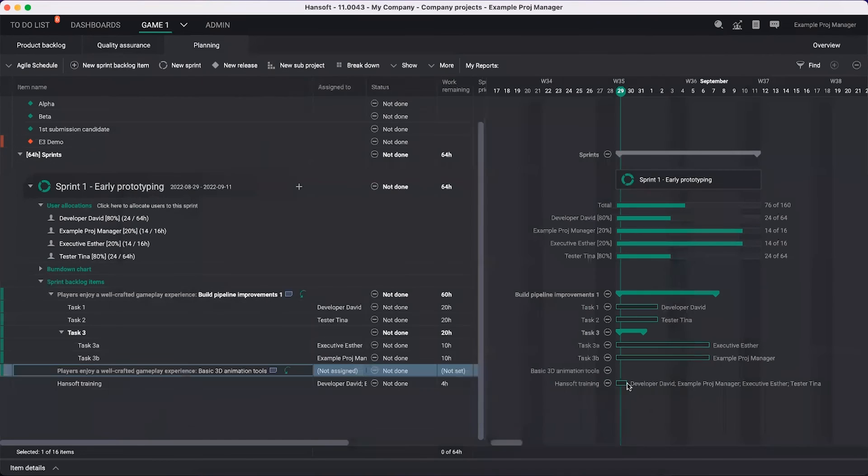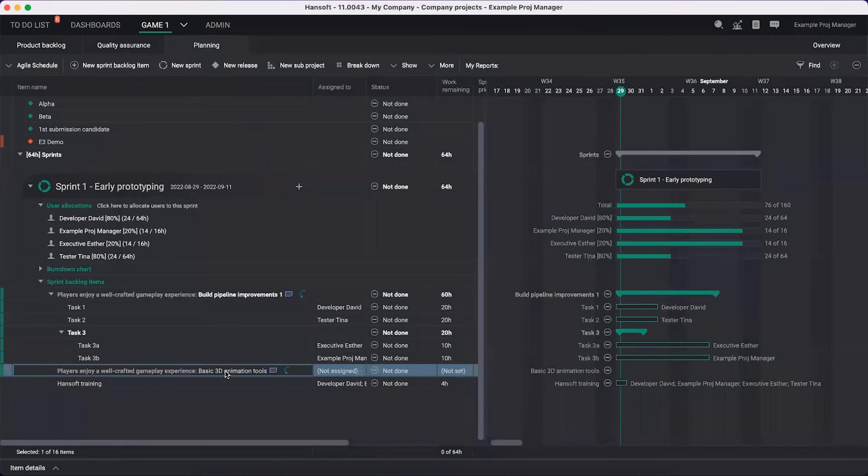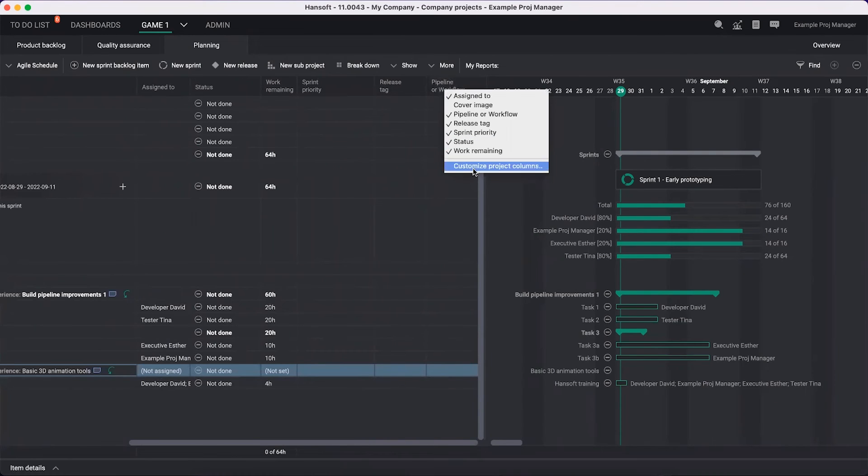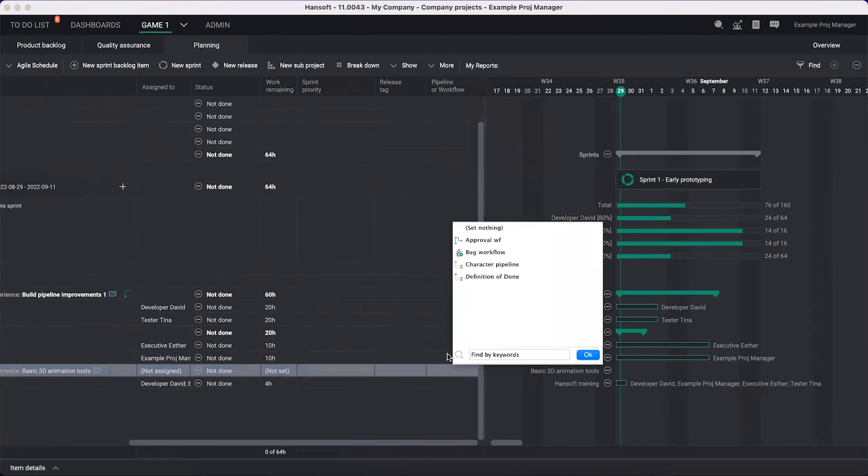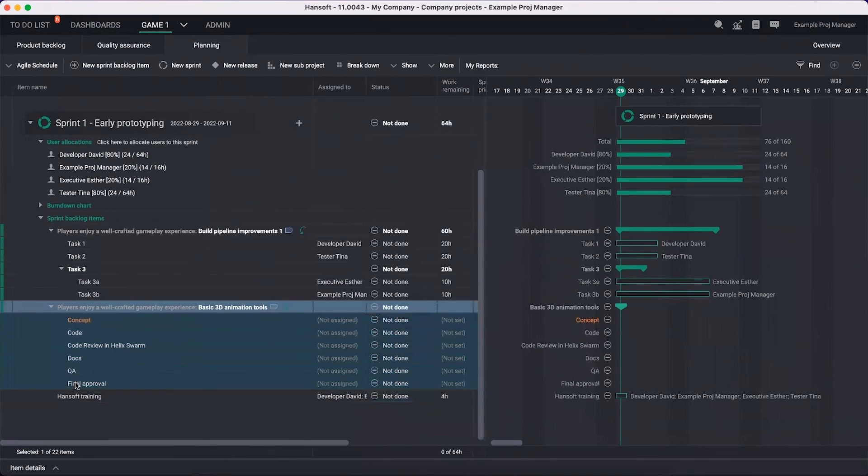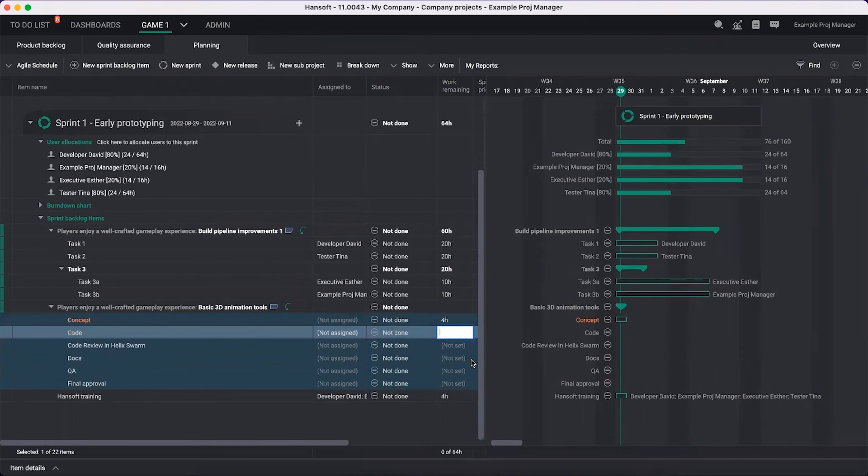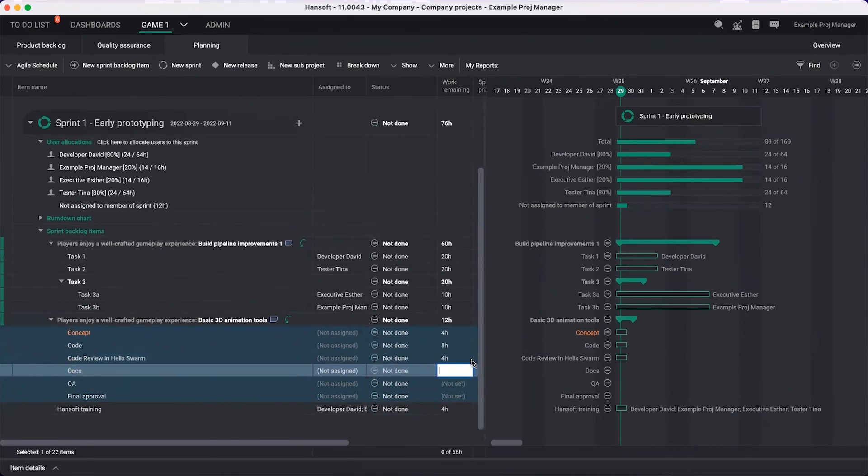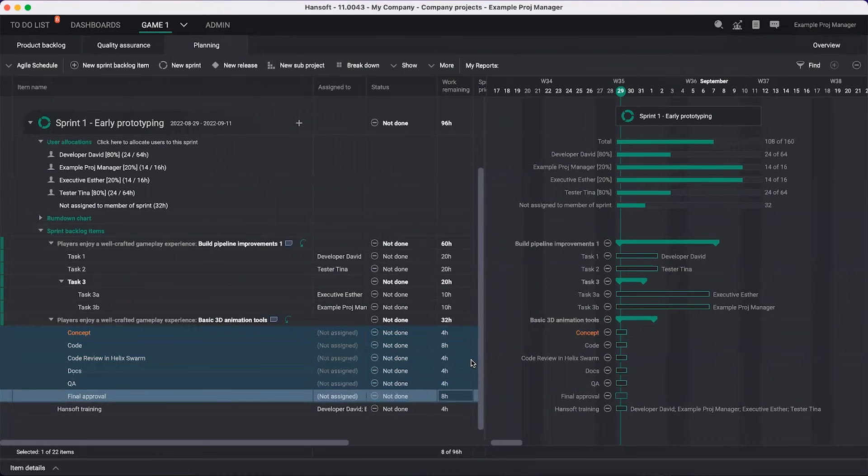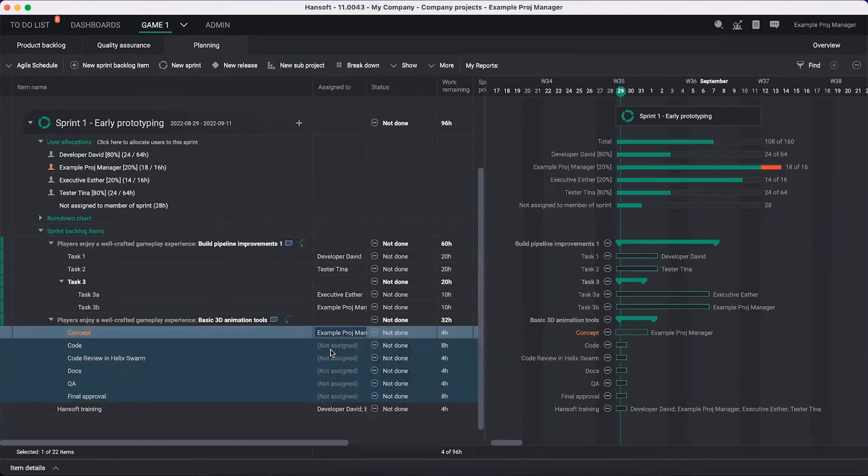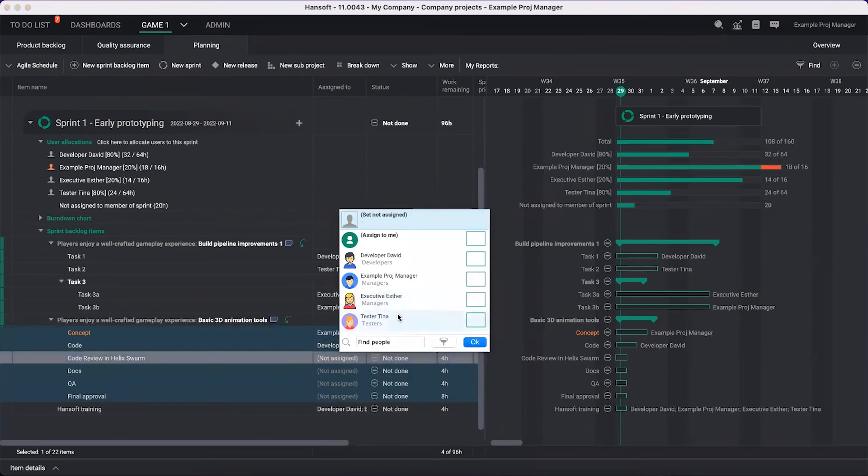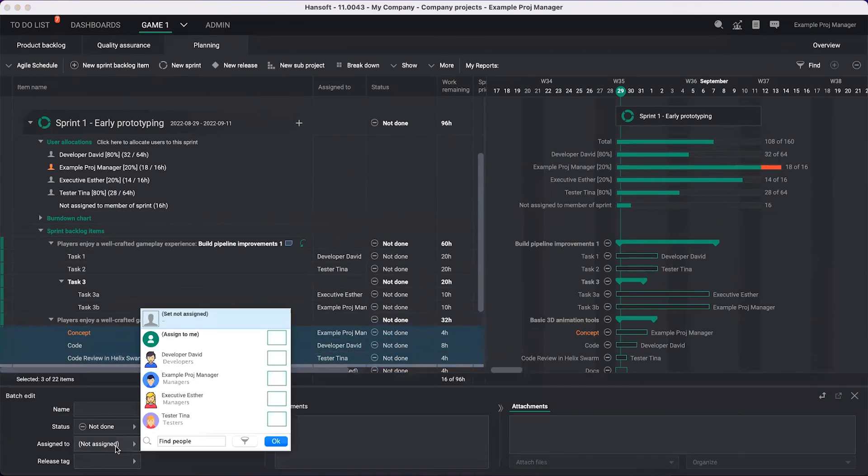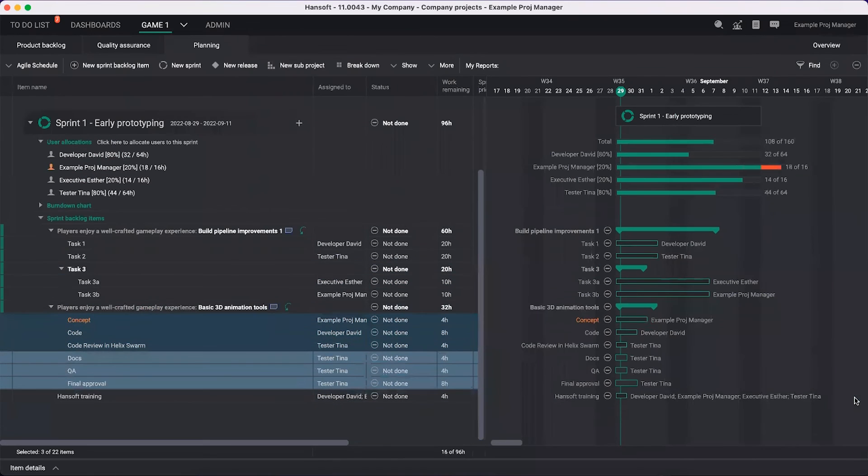I'm saving that, closing this. Now what I can do is say, for this basic 3D animation tools, I'm going to have a column here called pipeline workflow. If you don't see this, you just right click, customize your columns and activate this one. Then I'm going to select that I want to use my definition of done. Now that will pre-break it down for me. I could also have configured the work remaining and assignees in that pipeline already. In this case, I'm just going to do like this. I typically would recommend that you try to keep tasks somewhere between half a day and a couple of days - not too small and not too big. There should be a reason for people to go into Hansoft at least once every day. Let's do some assignments - to speed this up, I'm just going to assign all of this to Tester Tina using the batch edit window at the bottom of the screen. We call that the item details.